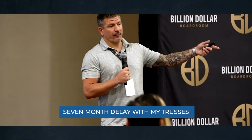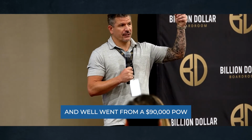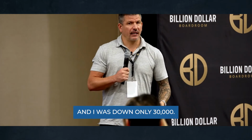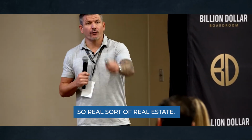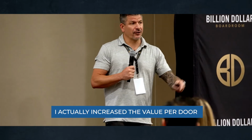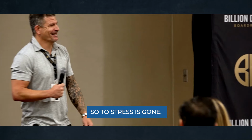That 7-month delay with my trusses actually stabilized lumber prices, and went from a $90,000 PO to not ordering it, to the prices dropped and I was down only 30,000. So I'm going, great, I'm only losing 30,000. It's $7,500 per door, not a problem. Guess what happened at the same time that lumber prices went up? So did real estate. So my $7,500 per door loss, I actually increased the value per door about 30,000. So whew, stress is gone.